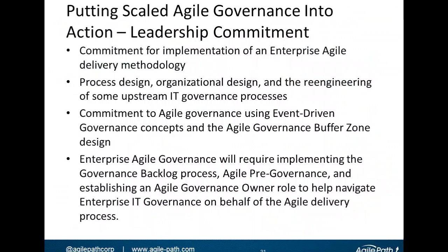Graphically, this Agile Pre-Governance process flow is what I'm illustrating here. So, product planning on the left, I'm showing green arrows feeding governance action requests into the enterprise and into the community governance team. That's where they'll get addressed primarily. Again, think about this happening months, weeks ahead of the need for these governance issues by a sprint team. In release planning, the same process is followed. Governance action requests are triggered to the community team and to the enterprise. Again, in weeks, not months, hopefully being addressed and resolved before sprint teams need them.